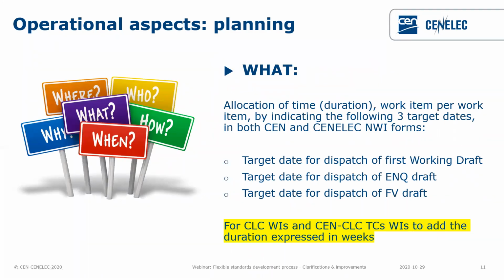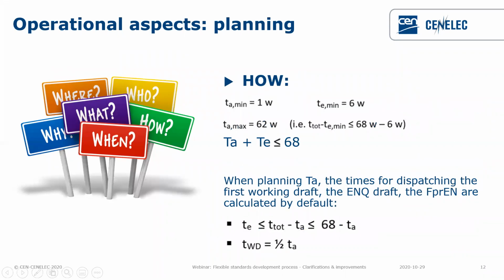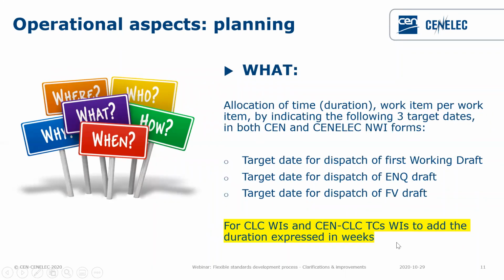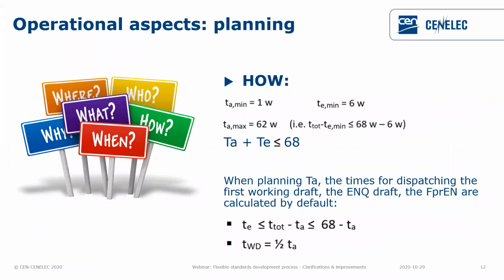A novelty, it's in yellow, therefore we will come back. For CENELEC work items and CENELEC JTC, sorry, here it's missing a J, JTC's work items, you will also be required to add the duration of the single stages in weeks. We will come back later for the reason. You may remember that for the CENELEC work items, in the webinar in March, it was a recommendation. Now it's mandatory. Indeed, and we will come back later on the details of why it has become a requirement.